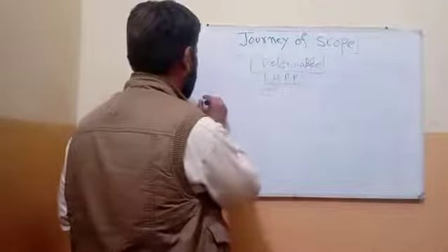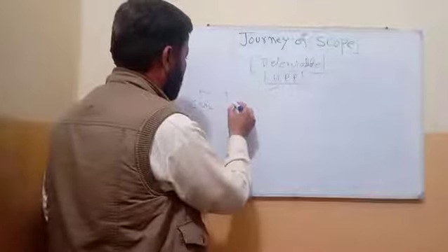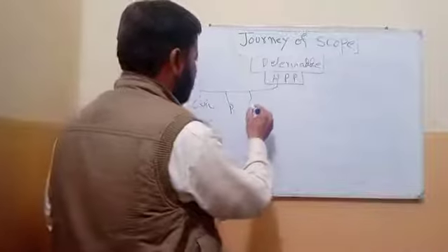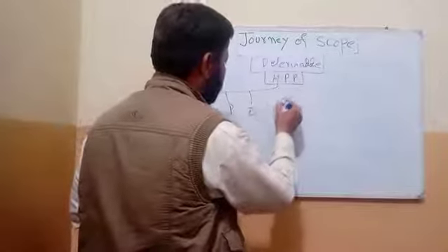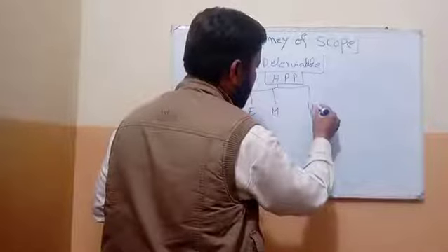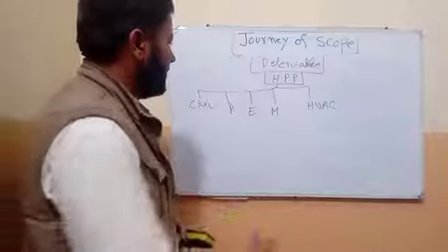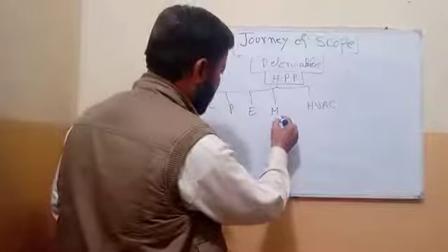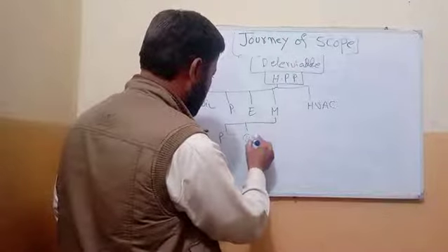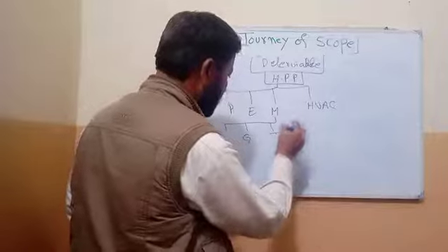In this we will use civil work, plumbing, electrical work, mechanical work, HVAC. Then we will divide mechanical work further into penstock, gates, turbine.